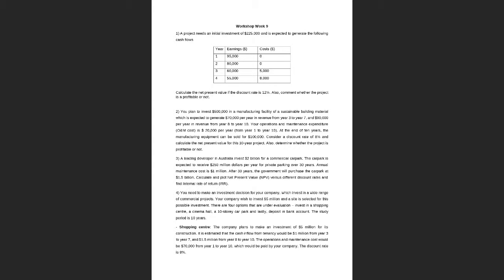So it's not the initial investment minus the discounted cash flow, but it is the other way: discounted cash flow minus the initial investment. Okay, so just be mindful of that. All right, next question, very similar with a bit more details added.